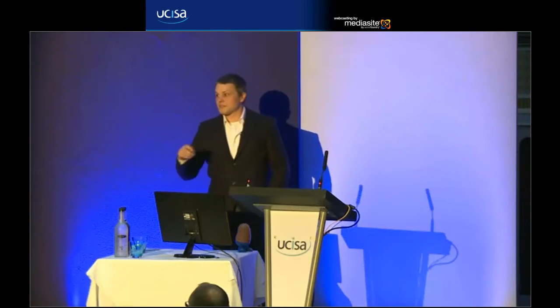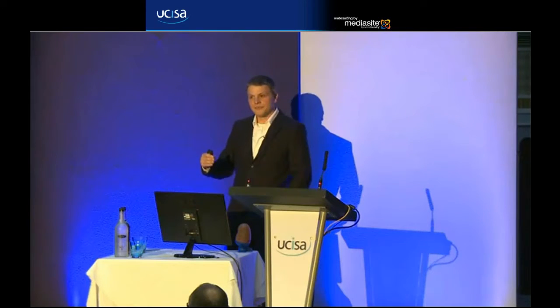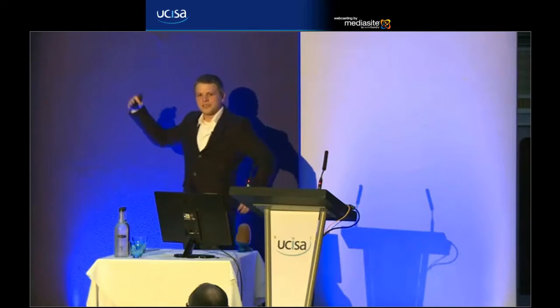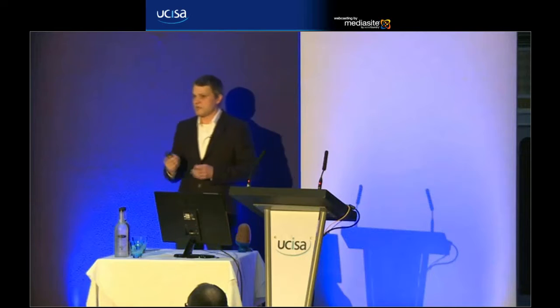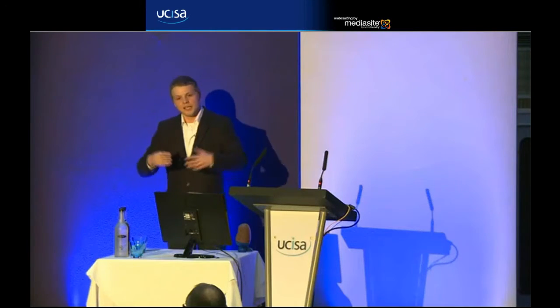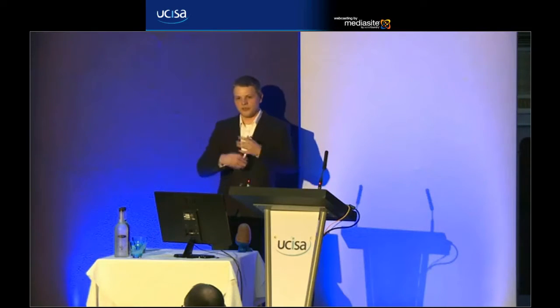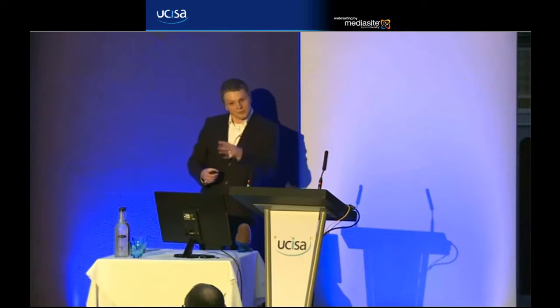And this technique can also be used for sizing at different levels. We're talking about sizing the overall project at this point, so as I say, we're talking about ideal days there. But we can also start to talk about tasks, and you'll see in a moment how we actually break down the work. For the tasks we can talk about, for example, ideal hours. So the sizing can be flexed to different things as well.